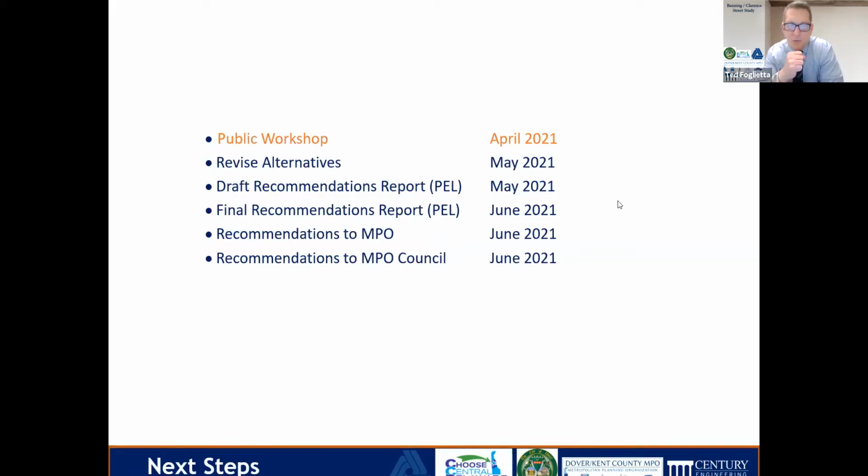So I wanted to talk about where we go from here. Obviously, we're at the public workshop now presenting this information. Based on the feedback we get tonight, we'll make some revisions to the alternatives and provide a draft recommendation report to the MPO for their review in May. That recommendations report is a PEL report, a planning and environmental linkage report. What that does is identify any areas of concern, environmental permits that may be required, and any instances that may delay the project. It will identify potential funding sources. So there's a lot of important information that will go into that.